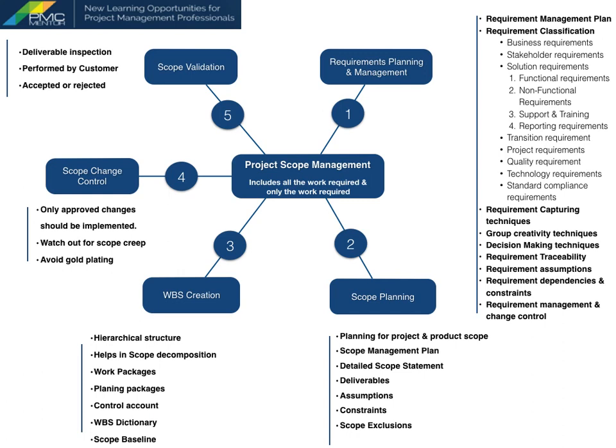Last concept is validation of scope, which involves inspection of completed deliverables by the customer. To avoid rejection, all produced deliverables must undergo an internal quality inspection and testing, before passing on to the customer.